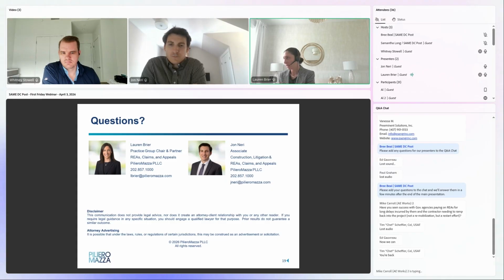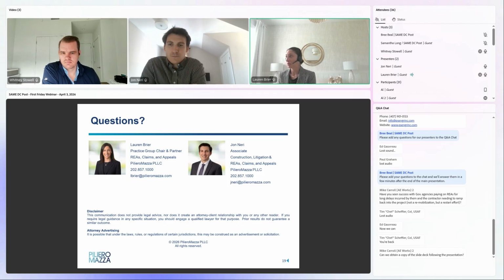So in construction, for instance, like John was talking about, the biggest trip up we see is schedule impacts. I saw somebody had asked a question about how we see success with government agencies paying on REAs for long delays. We certainly do see success, but that is very much driven by schedule support. We also have clients that may not have good in-house schedulers. We've often seen deficient scheduling. And if that's the case, the government's not going to pay out costs associated with an extension or a delay, even if driven by the government, if the schedule is not there to support and show impacts to the critical path, for instance.